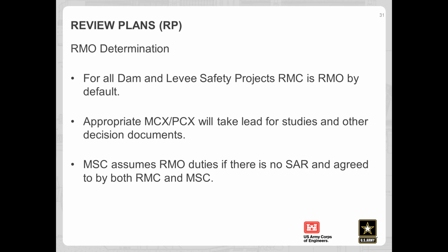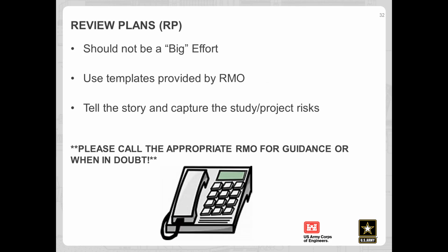And again, as I mentioned before, the RMO for dam and levee safety modifications is the RMC, but the appropriate MCX or PCX will take the lead for other studies and decision documents, and the MSC is the RMO where the district chief of engineering has made the determination of no significant life safety risk and it is agreed to by all. Even though I may have made review plans sound like a big effort, we don't really want it to be a big effort, but we do want to have that thought process put into it.